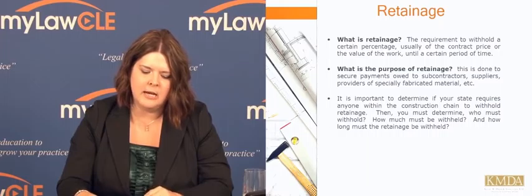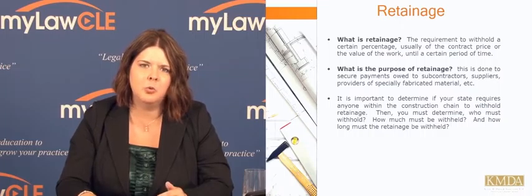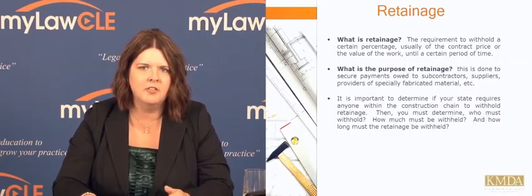So I'll give you an example. In Texas, we have a 10% retainage requirement that is required to be withheld on everything but state bonding projects. So the GC must withhold 10% from all of his subs. And then what happens is a lot of the subs will withhold down the line the 10%.